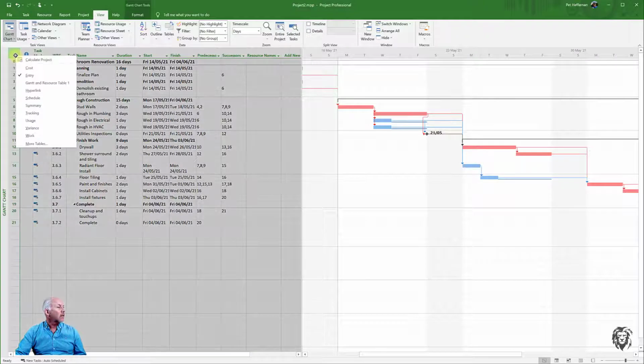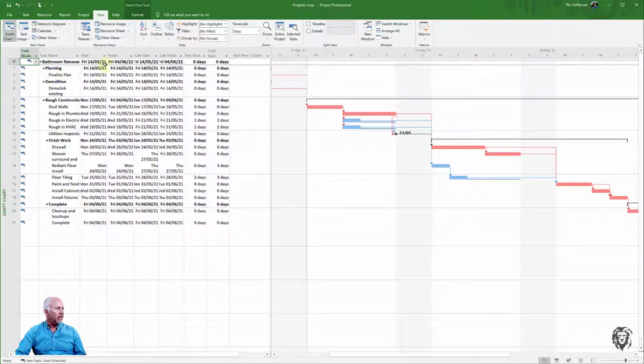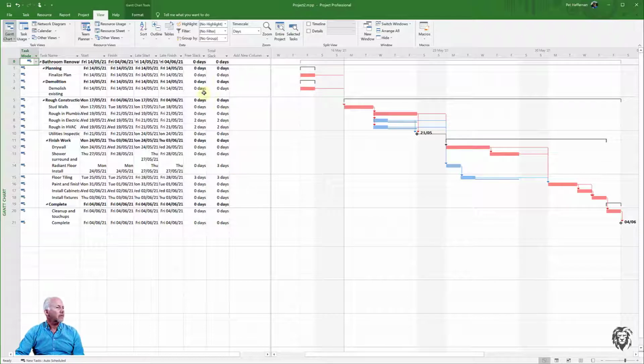So within this, now we can start to see, like in the schedule view, you can have the start and finish, and all of those dates have been updated over our project. Let's shrink our project down so we can see it. And it also gives the late start and late finish and slack calculations. And so this comes right out of the critical path method. And so we have our critical path showing, and it's being calculated for us. But certainly if you go back to what goes into the calculation with the forward pass and backward pass for that critical path determination, we can see that information being displayed here and represented graphically on the Gantt chart.